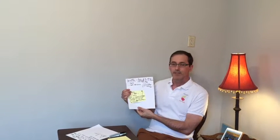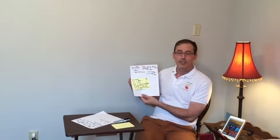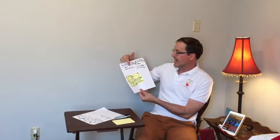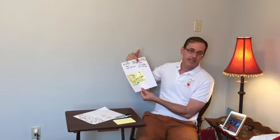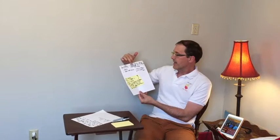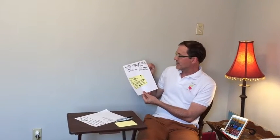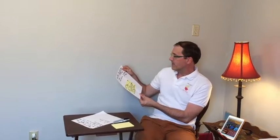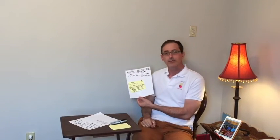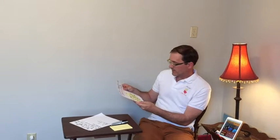All right. So that was developed by looking at the metrics about how much work I project I can accomplish. And here are a couple of those metrics. I had a revision metric where I could revise a page every 3 minutes. And with the 10% Solution, over a couple of projects in the past, I can do about 250 words an hour. All right, so I came up with 2 stories,